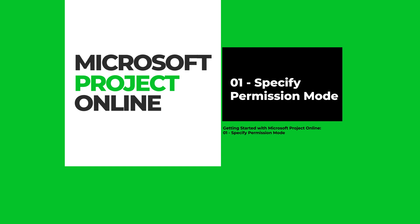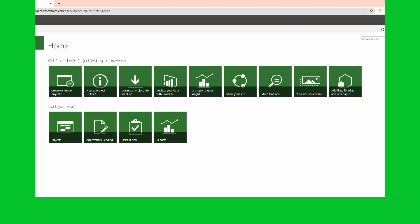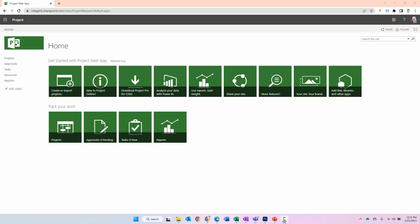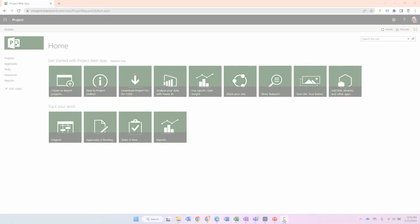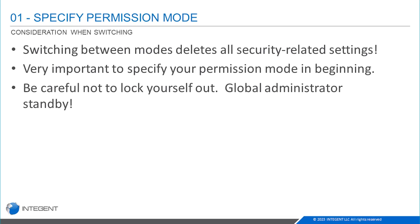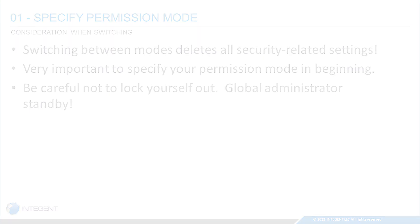Hey there folks, thanks for attending this video getting started with Microsoft Project Online. This is the first segment, specifying the permission mode. We're going over this one first because it's kind of important. You really want to specify the permission mode first because if you don't specify it first and you have some settings specified in security, you change it down the road and it will wipe out all previous security settings.